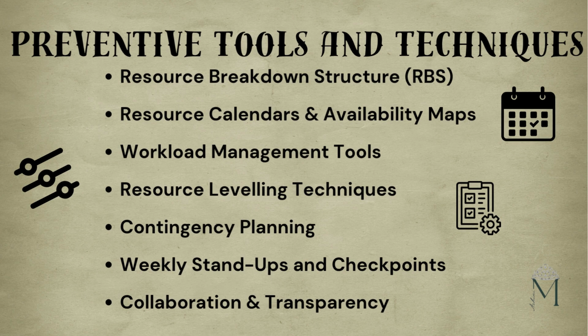Use resource calendars to check actual availability. Tools like Microsoft Project and Smartsheet let you see who's available, when, and how long. By doing so, it will avoid scheduling someone who's already booked elsewhere.